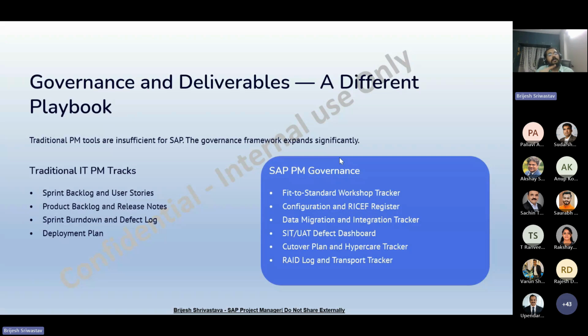But before starting or creating an FSD, and before onboarding your team and all those things, you need to follow proper steps. First you need to prepare the project charter. Before preparing the project charter, you need to set up a kickoff call, take an approval, ask in a detailed way, and prepare the project charter. Then you need to do, in parallel, the project impact risk assessment.